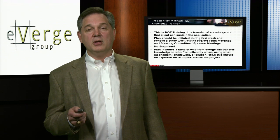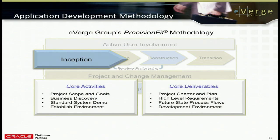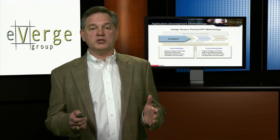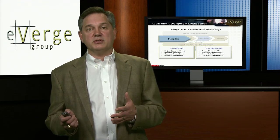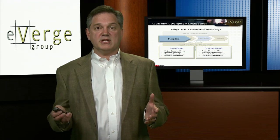This knowledge transfer plan differentiates our methodology and differentiates eVerge from other firms. When customers call our references, this is one thing that typically gets referenced as very positive. Now let's briefly cover the stages of Precision Fit in more detail. The inception phase is where you define the business objectives of the project and how you're going to measure them — so you can take a before and after picture and actually measure our success. Then we do discovery: we want to understand what they're doing now — not to mimic it, but to understand their pain and why they're trying to change. We start doing standard system demonstrations so they know what they bought, and we establish development, test, and staging environments.